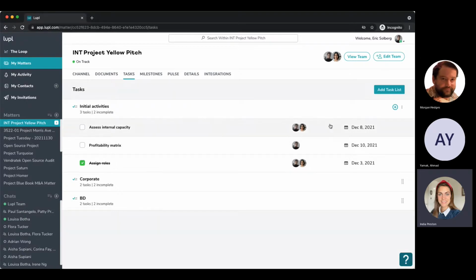As tasks become overdue, they will appear red, and you'll be able to see and track people with tasks that are overdue in the loop and people in your team. And that's the resource management angle that you're getting the benefit from. You might see that someone's actually just got a lot on their plate at the moment. They need a little bit of help. And you might then be able to facilitate a discussion with them to see if you can delegate out some of their tasks.